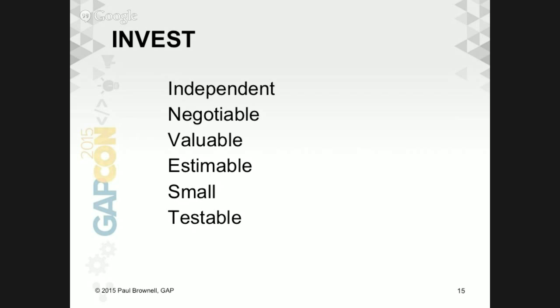As an example, in developing mobile applications, we will often build the web services features one sprint ahead of the user interface on the mobile handset. So we'll build the web services, we'll test them in a test harness to make sure that they're responding the way they're supposed to, and then in the next sprint, we'll build the mobile pieces, the user interface that accesses those web services.